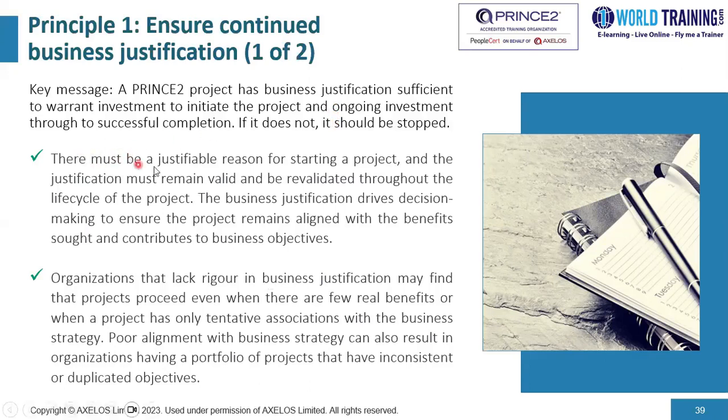Now, there must be a justifiable reason for starting a project. And not only do we need a reason to start, but that particular reason or justification must remain valid and be revalidated throughout the life cycle of the project. The business justification drives decision-making to ensure the project remains aligned with the benefits sought and contributes to business justification.